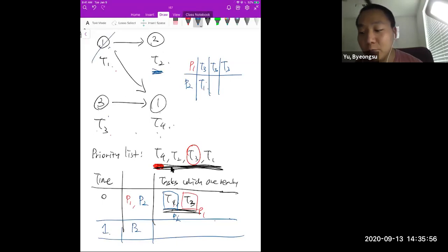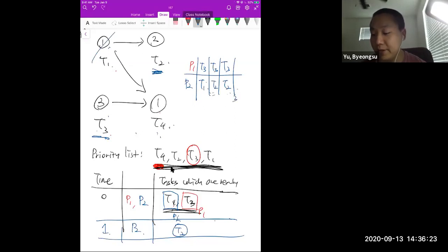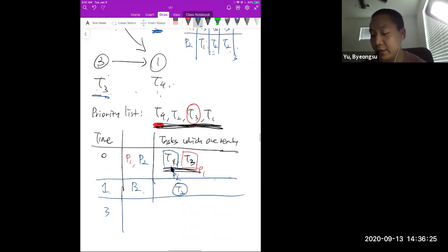Because to make T4 ready, you need to complete T3 first, but T3 is still being worked on by processor 1, so T4 is not ready at this point. So the only task which is ready at this point is T2, so you can just assign T2 to P2 to complete the job. And T2 takes 2 minutes, so after 3 minutes have been spent, now again our processors P1 and P2